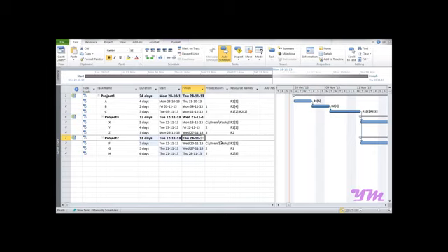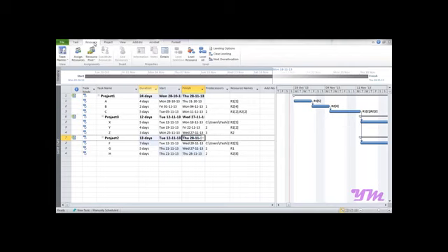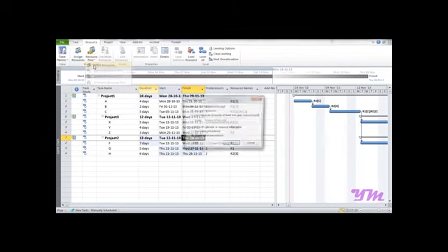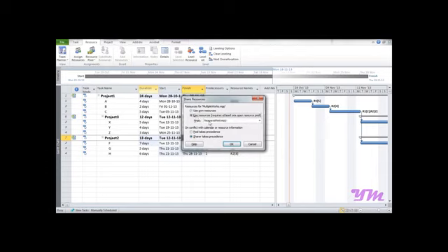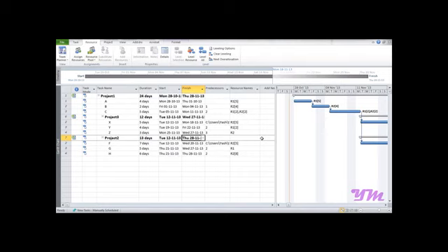Now suppose you want to similarly add another predecessor to the same, you may again write the whole path after separating it by a comma after the previous path has been completed. So this is how you connect the different files in Microsoft Project 2010. Now we need to add resources here again as we did previously, that is, go to resource pool, share resources, use resources from, select the resource pool.mpp file and press OK. So now the resources are again being connected with this file too.